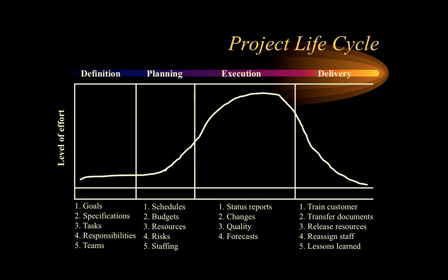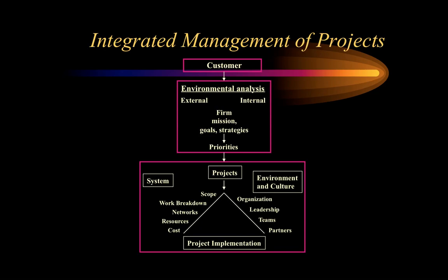We're also looking, in the delivery phase, at training the customer, transferring documents, releasing resources, reassigning staff, and then of course examining lessons learned from the project, the entire project initiative. All right.